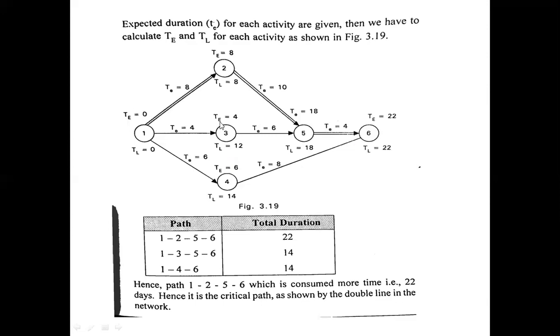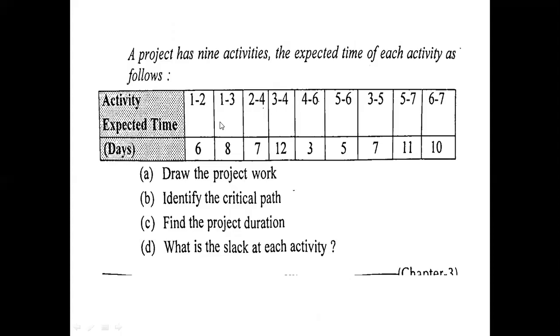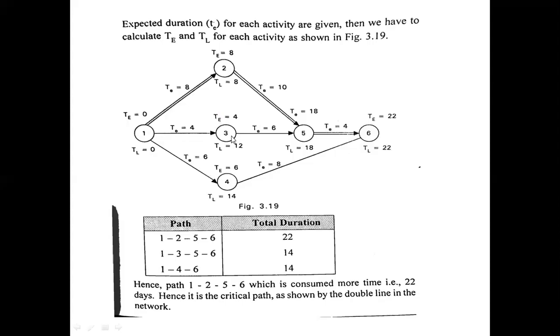So what is our next step? We have to calculate the latest finish time. The latest finish time must be calculated starting from the last event.